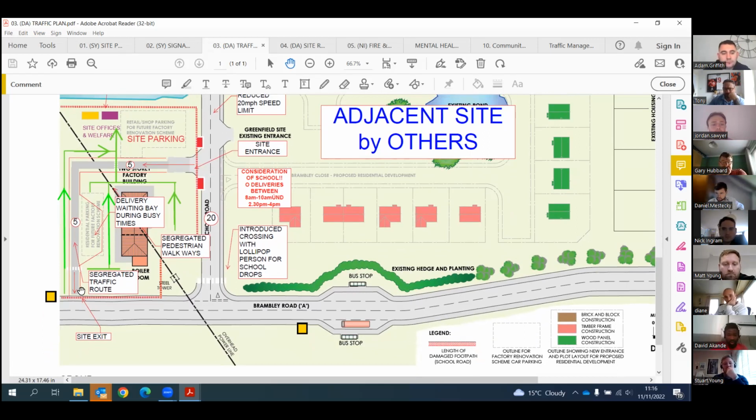That makes it easier for us so that vehicles don't come in contact with pedestrians. Also, we've got our walkways, as you can see on the site plans. We've got our walkways, we've got our pedestrian crossings, and there's no clash on site. Everything is well planned. And we also made sure that we spoke with our suppliers. There will not be deliveries in the peak hours, knowing that it is a very busy environment.